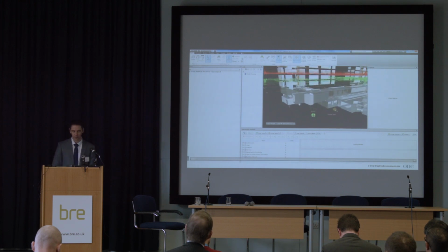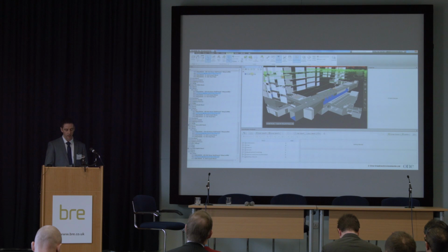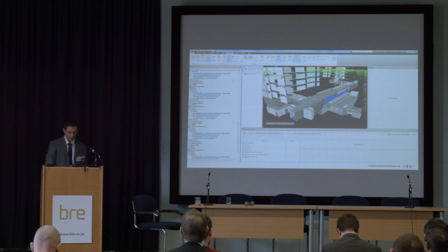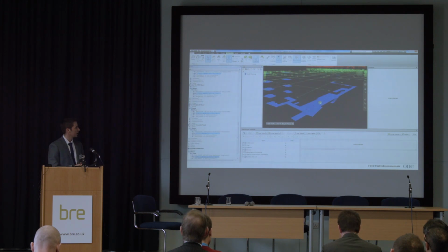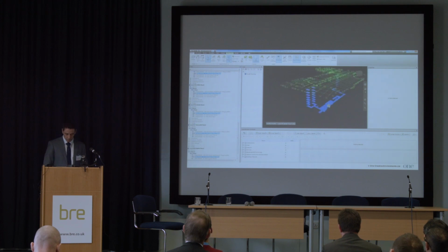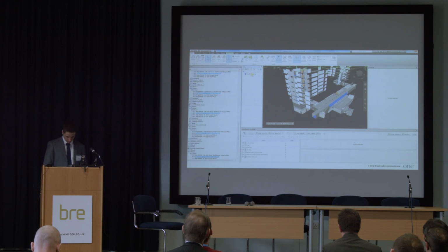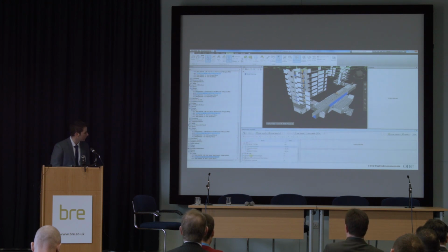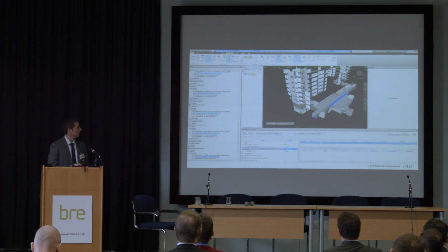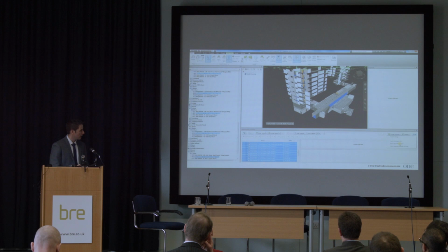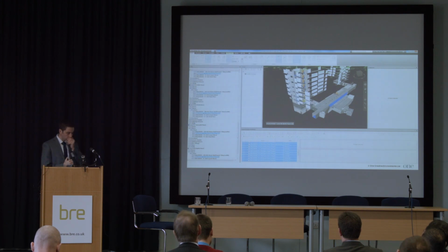So within Navisworks, all I've done is, because I know that all my data has got attributes, I've created a selection set of a flooring, which just happens to be the FL250. As you can see there, now I've clicked on the data set, I can neatly see that. And what I can then do is go into my quantification tool, which is set up down here at the bottom, and this again is just straight out of the box. So I go into my quantifications here at the bottom, I select my interior finishes, I drag that selection set into there, and now all that geometry has gone straight into the schedule and it's also taken the data with it. So now if I just export that to Excel,